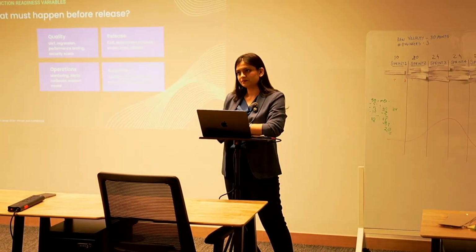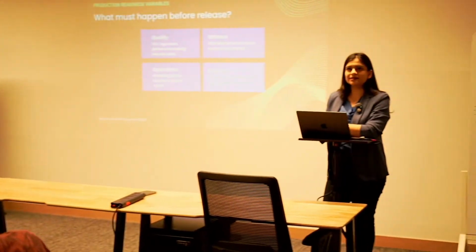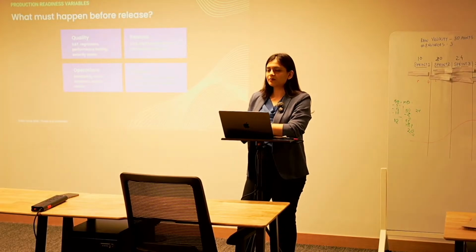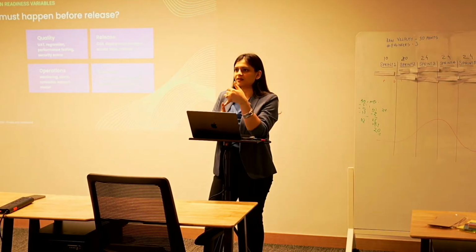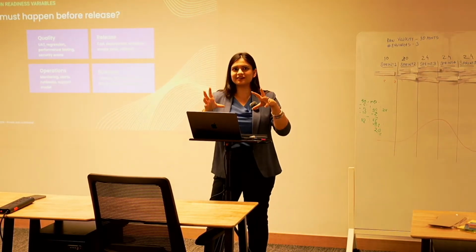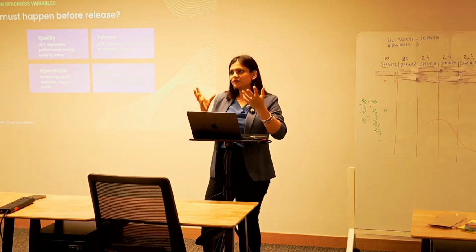Correct. So if I'm developing feature A in like 2 sprints, then that feature can be tested in a UAT type of environment, not the development environment. It will be the UAT, which is a bit more stable. So it could be like by fourth sprint I'm doing FNF, and by fifth sprint I could be ready for production. Yeah, I think it depends on what you think is releasable, right? You need to understand whether we are bringing any value, whether we're solving any problem. Like say for example, by Sprint 2, you've only set up your DB, you've only set up your application code, and there's only a welcome page or home page, right? Is it even worth releasing?